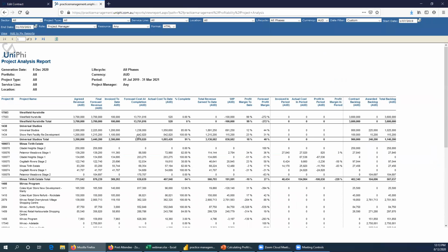So the first element of these particular costs will come from the timesheet system. So you can see here, it's the actual cost here of 842. It's coming from the timesheet system times rates, and we're going to get to that in detail later. It also comes from the internal cost chart of accounts, which we're going to get to later too. So you can do a chart of accounts method only, or a rates method only, or a combination of the 2, which is typically what's done.